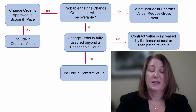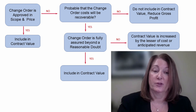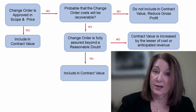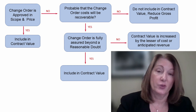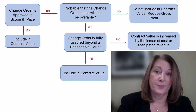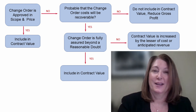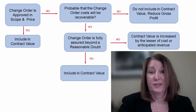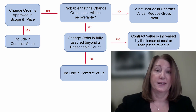You're going to need to determine if the approval of the change order is assured beyond a reasonable doubt. If the answer is no — it's not totally assured beyond a reasonable doubt — you're going to take the lower of cost or anticipated revenue. In the case of cost, that means you're going to recognize zero gross profit. In the case where the anticipated revenue is less than cost, you're in essence recognizing the loss at this point in time.